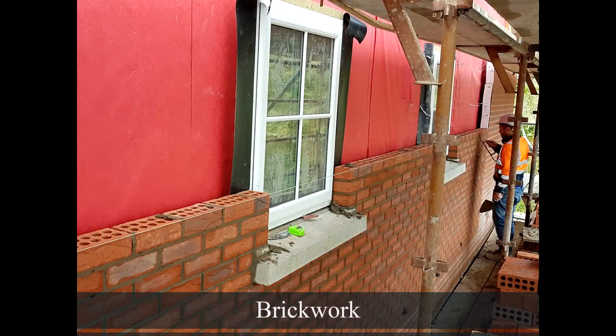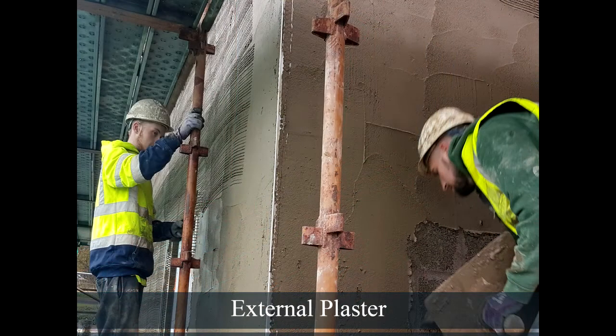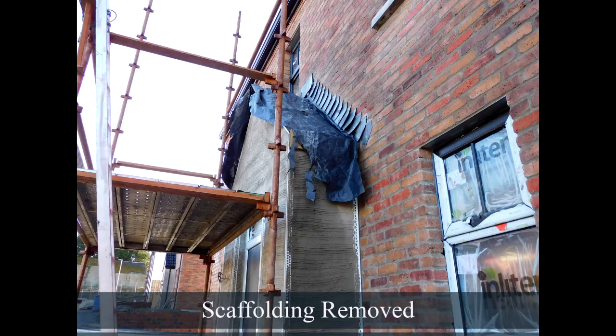The brickwork can then commence, with particular attention to expansion required around the windows, doors and the roof. Blockwork is plastered in 2 coats, scratch coat and then render coat. The plaster is then painted when dry. The scaffolding can now be dropped and the external groundworks commence.